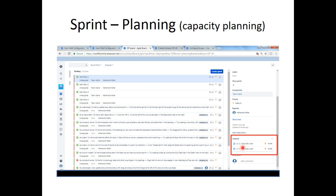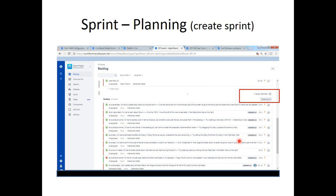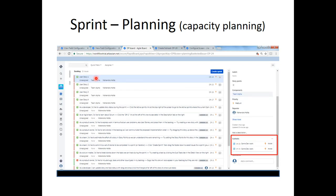As you can see, I have created some tasks for User Story 1. When you choose User Story 1, the sidebar shows the details of that story — if you scroll down, you will see the subtasks as well. Now let us create a sprint by clicking Create Sprint. You need to task out all the stories and create subtasks for them — development, impact analysis, design, testing, whatever is needed.